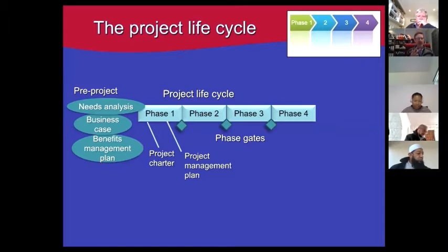You've got two different things. You've got the project life cycle, the different phases. That depends on from one industry to the next, from one company to the next, what phases they have. The project management processes are generic: initiating, planning, executing, monitoring and controlling. Okay. Now, those processes, you adjust for your project.